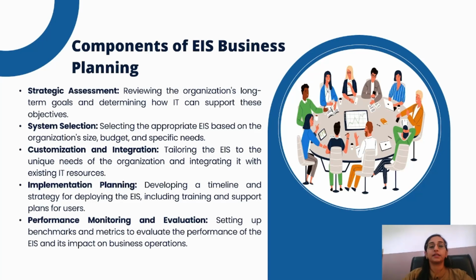Next key element is risk management. So, conduct a risk assessment to identify potential challenges that could impact the project. Common risks include technical issues, resistance to change from employees, and data migration problems. Develop mitigation strategies for each identified risk. This could involve contingency planning, additional training, or investing in higher quality data migration tools.